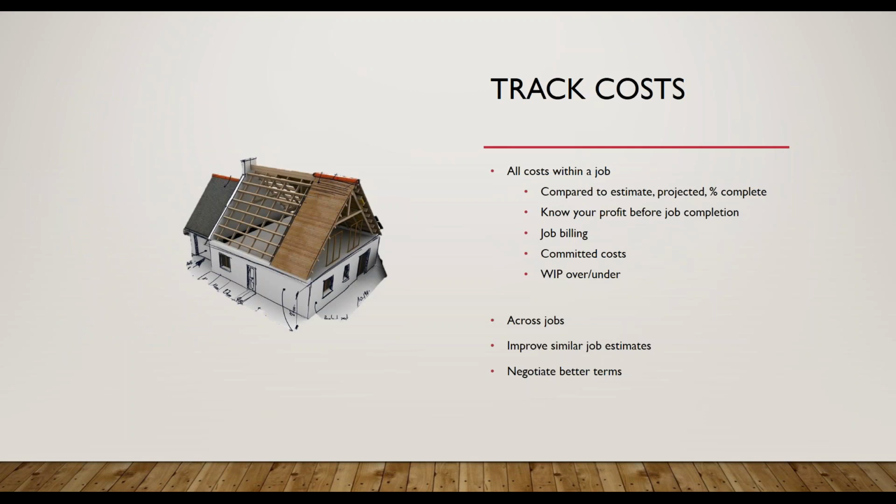So tracking the cost is the whole point of setting this stuff up, so you can see exactly where each job sits from a profit point of view. This lets you see your estimate compared to projected results and your percent complete on each job. It lets you do something about profit and cost issues early in the project. So a good job costing system gives you an excellent picture during jobs. And who knows, you might be able to negotiate better loan terms, or contract terms with owners or subs if you're armed with this type of information and have it at your fingertips.